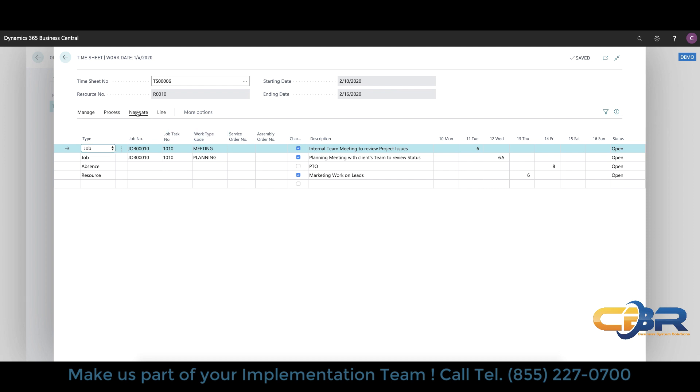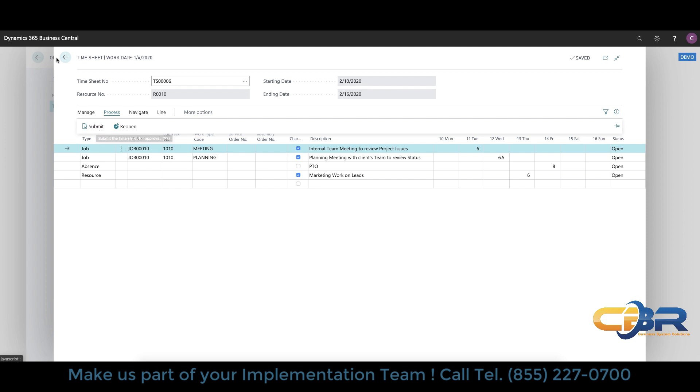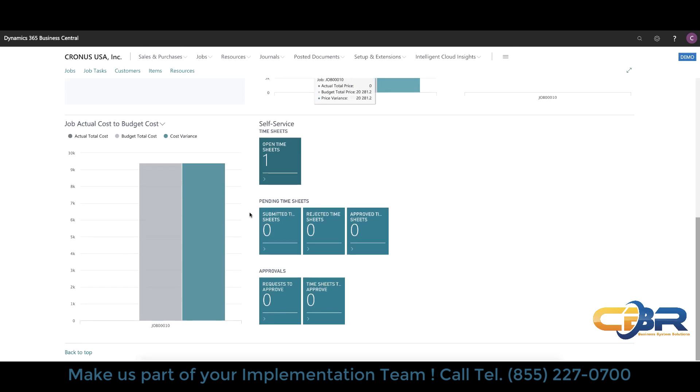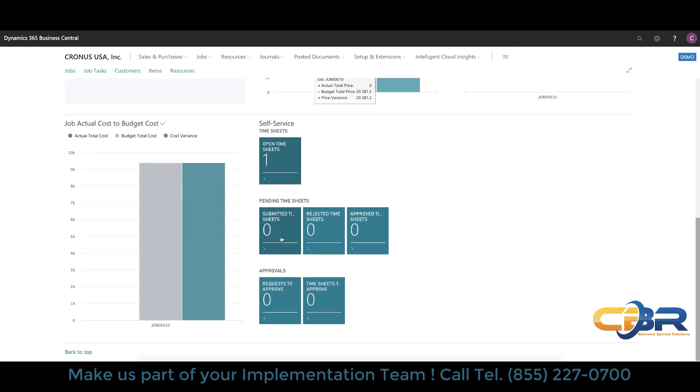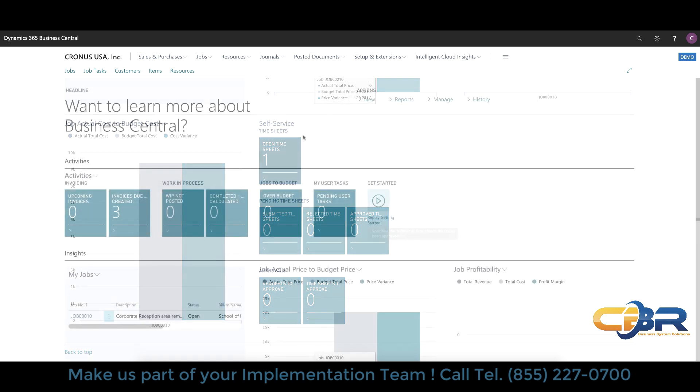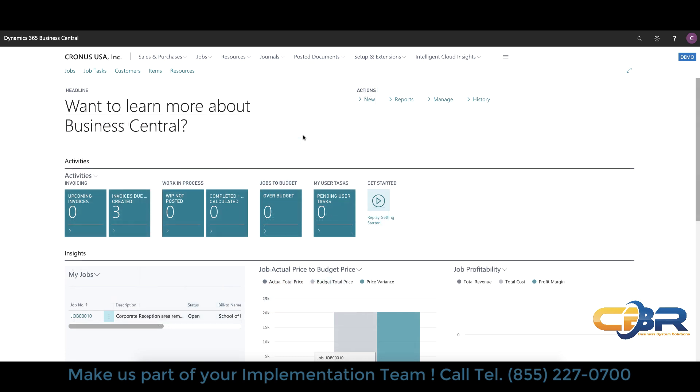Once you're done with your entry you can go through a submission process here that will submit the timesheet to your supervisor and your supervisor that's set up in the resource card that we talked about a bit ago would be notified and the workflow would be triggered for that. Of course that person can decline the worksheet and timesheet and you have to go back in and make adjustments as requested by your supervisor. So that's the timesheet functionality that you see here it's quite powerful. Once you are submitting the timesheets to your supervisor they'll show up in these pending timesheets here and it could be either rejected or approved and you can see them quite quickly here as a manager from your dashboard.